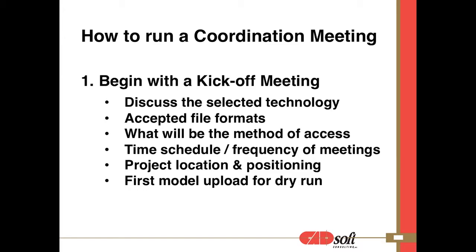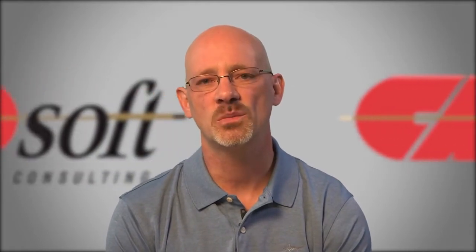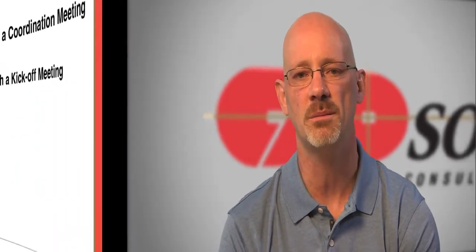gaining access to the Glue cloud or the FTP sites. That way they can alert the VDC manager if there are any problems, if they can't access something, or they don't have permissions or rights to do so. And then that the models are actually aligning, even if it's just a simple three-dimensional cube that you submitted as your particular mechanical model, electrical model, or whatever it may be, so that everyone is lining up together. And once that's out of the way, then we can launch with our first real meeting.